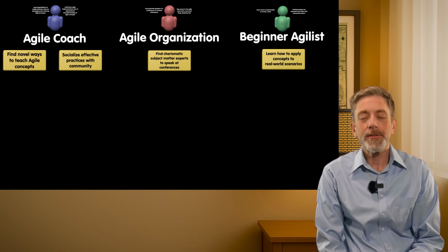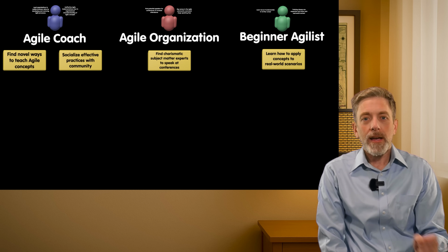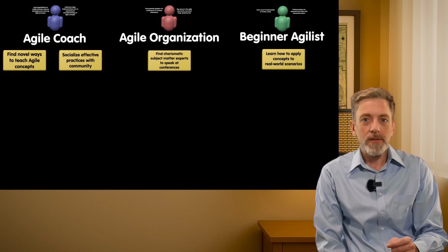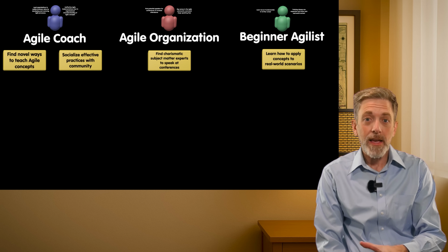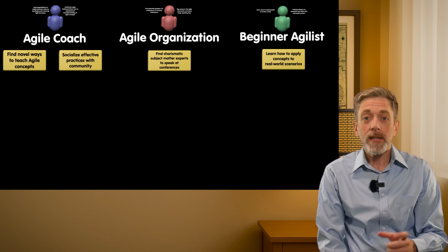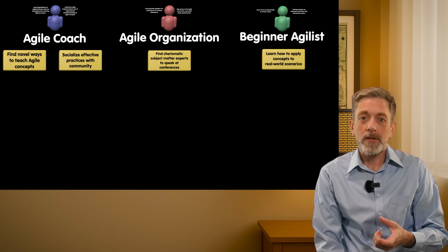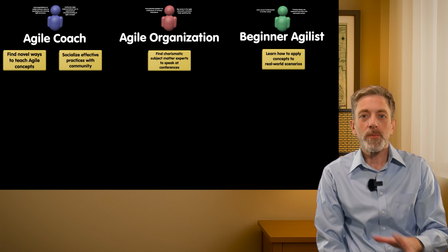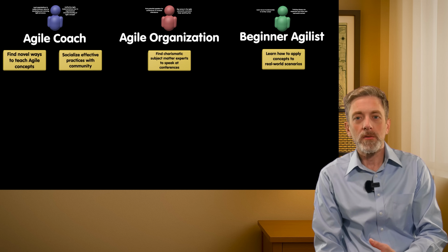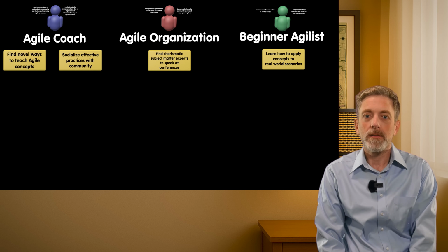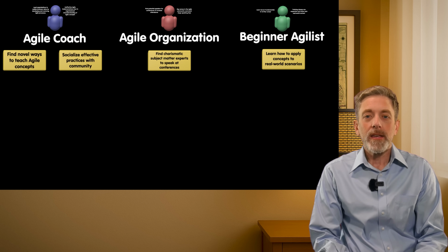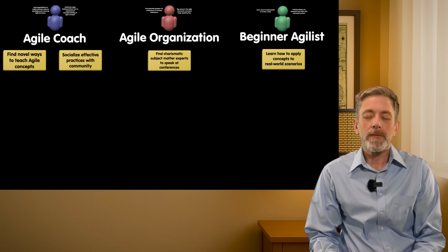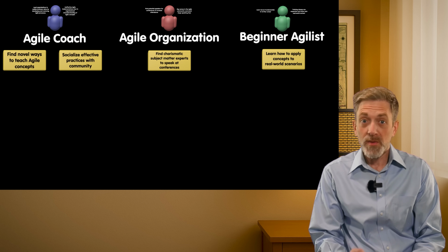One final note on features. When overlap exists between personas and the functionality is exactly the same, then in that case, we should map the feature to the higher priority persona, which is simply the first persona we map, and it should be the most important to your product. That way, when we get to those other personas, we can focus only on the features specific to them.